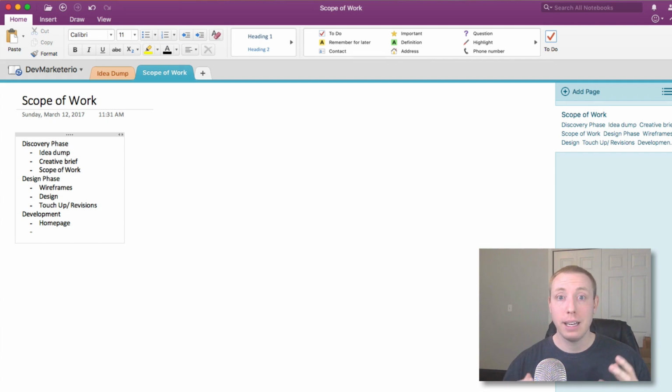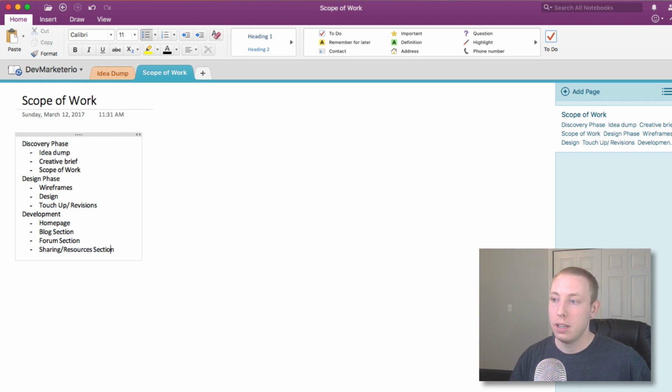After that, I like to break it into sections. And this is really good if you're building some sort of like a CRUD website, like a blog or something like that, because you can break it up by resource generally. So if you think about it this way, you can have like a blog section, and then we would have the forum section of our website. And then we would have the sharing / resources section. And then after that, you might just have your miscellaneous